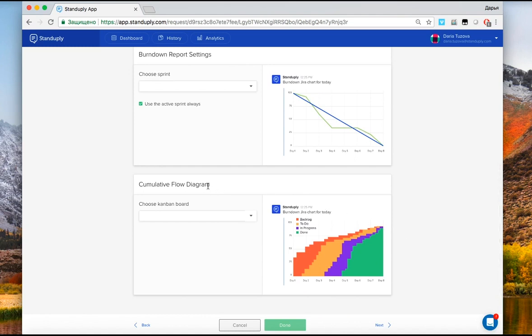Cumulative flow diagram. Cumulative flow diagram would be useful in cases like you have several tasks. Each task involves several stages. You want to track how long it takes for your team to complete each stage? Or how long it usually takes for your team to progress a task from being requested to done? To take immediate action if the tasks start to arrive faster than they can be processed. You will understand it if the distance between the arrival and departure line starts to expand rapidly.